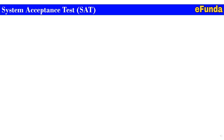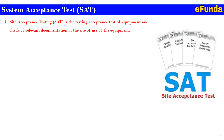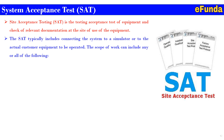A SAT is a site validation test where the devices are evaluated in compliance with the client's validated test plan and procedure, as well as the requirement to demonstrate that the system is properly installed and interfaced in its working environment with other devices and peripherals correctly. The SAT typically includes connecting the system to a simulator or to the actual customer equipment to be operated at a site.